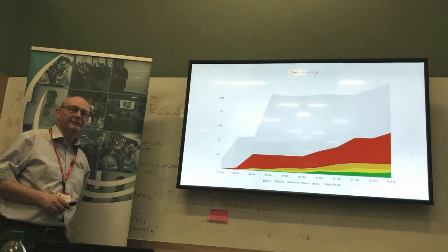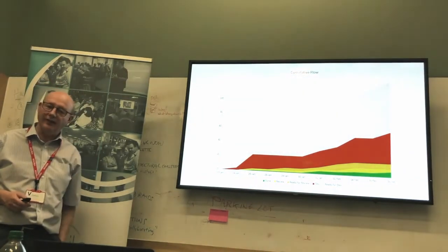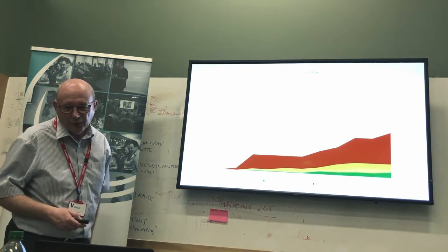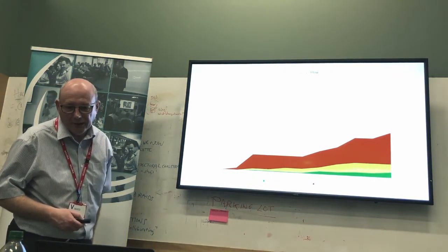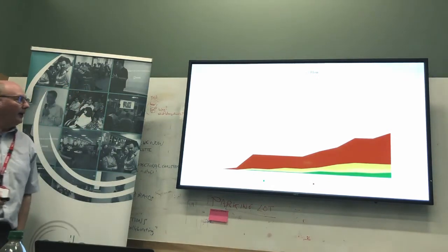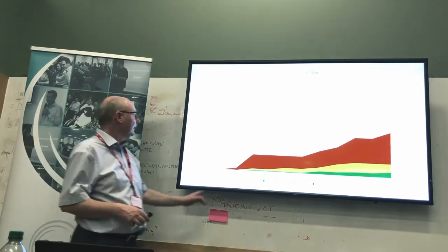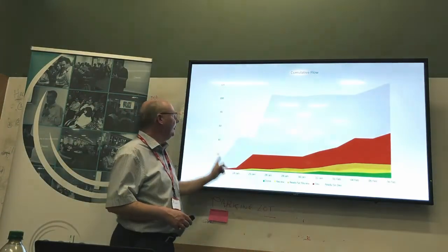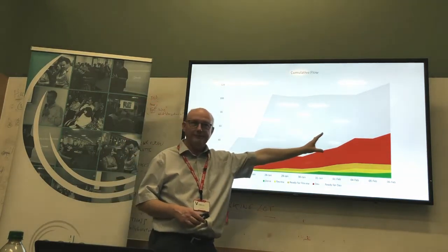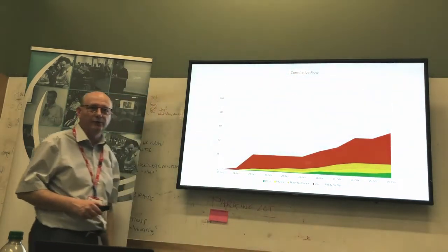Yeah, I'd say so. I think that's a pretty good interpretation of that. Yes, they'd done the great push and they had nothing in the backlog. And then, remember, if you have disruption to your flow, so this is clearly a disruption to the flow, what happens is the effect of this disruption always extends way beyond the end of the actual disruption.